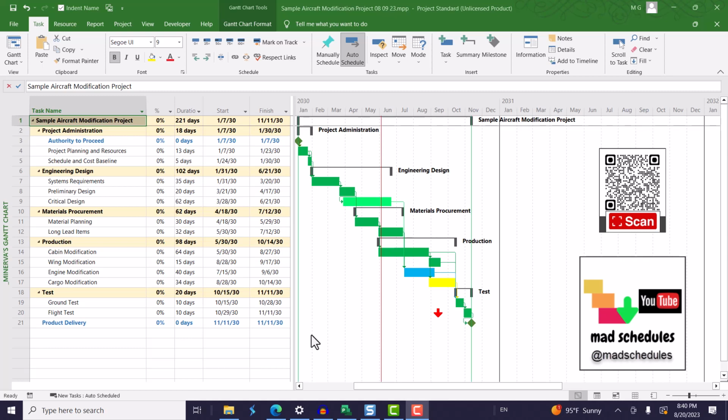And then it checks for invalid dates. Invalid dates may be dates that don't make sense in the schedule, such as dates that are in the past that you have not completed when you're statusing your schedule. Say that I am saying that I have done everything today, and in my schedule it shows that something is due last week or a month ago. That is not valid.